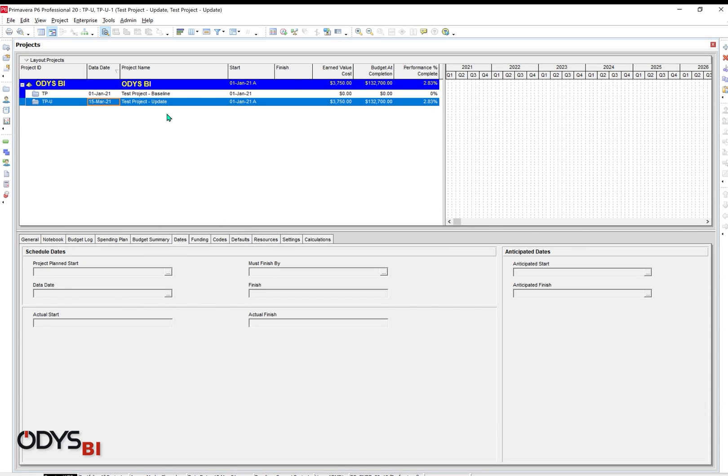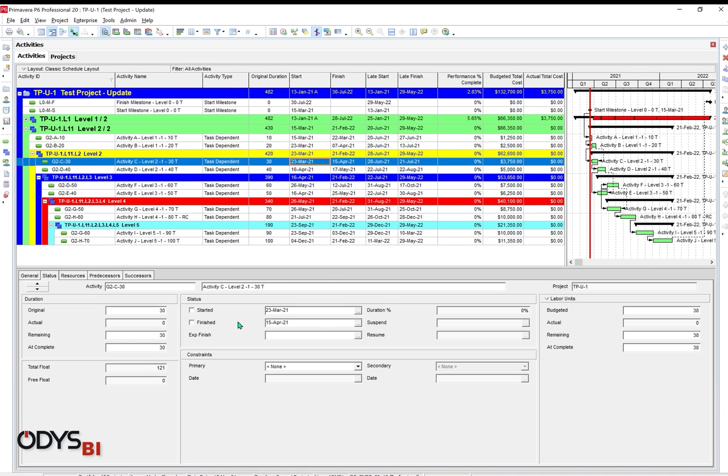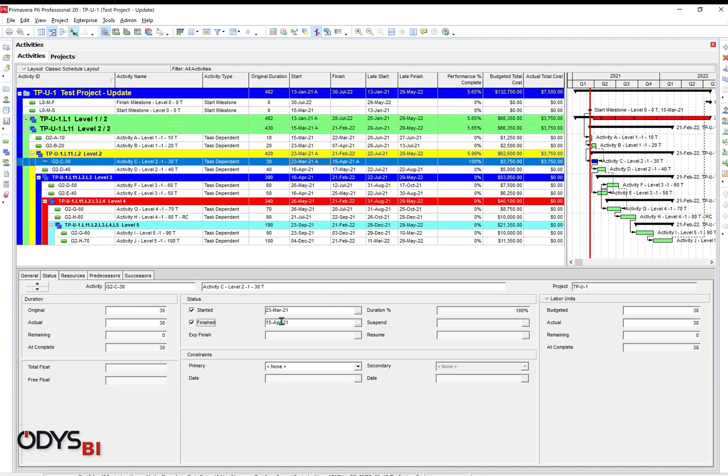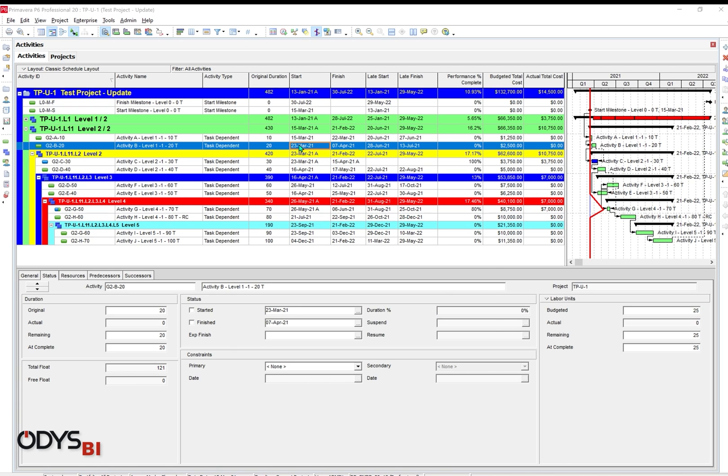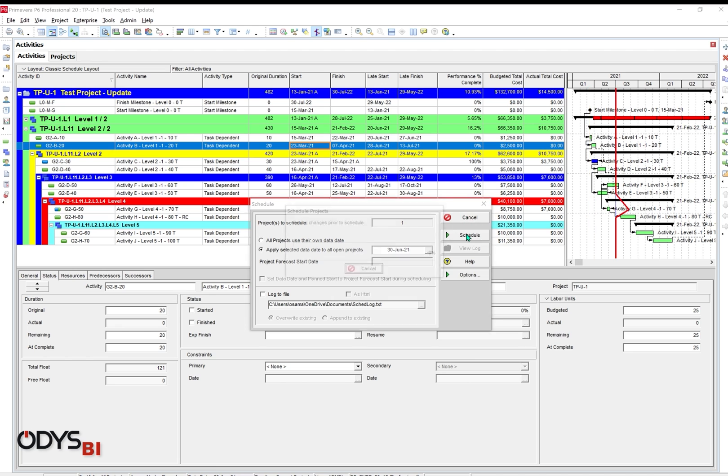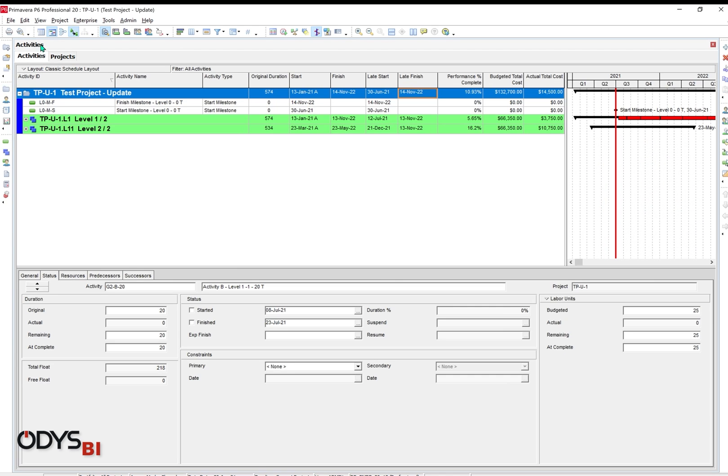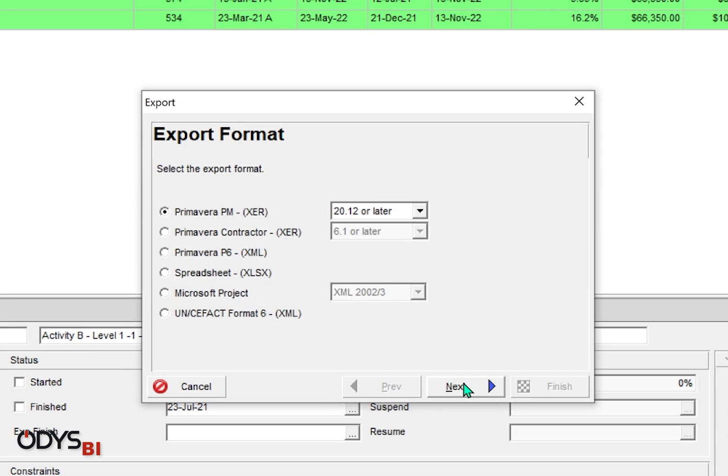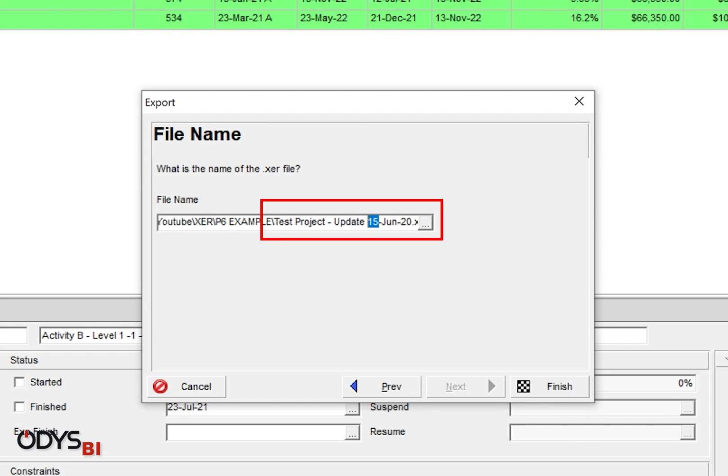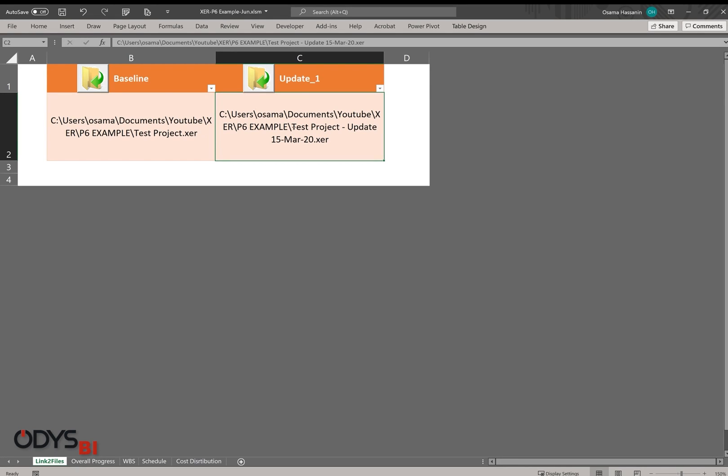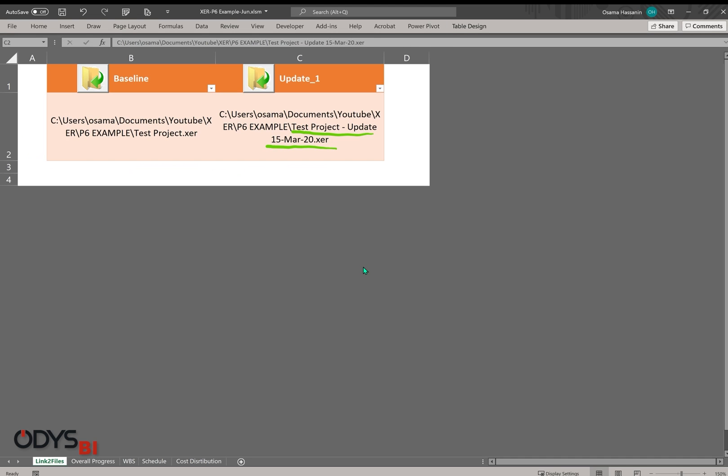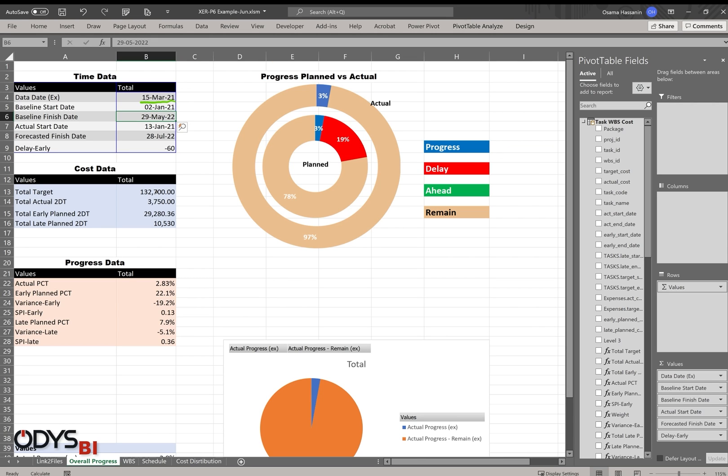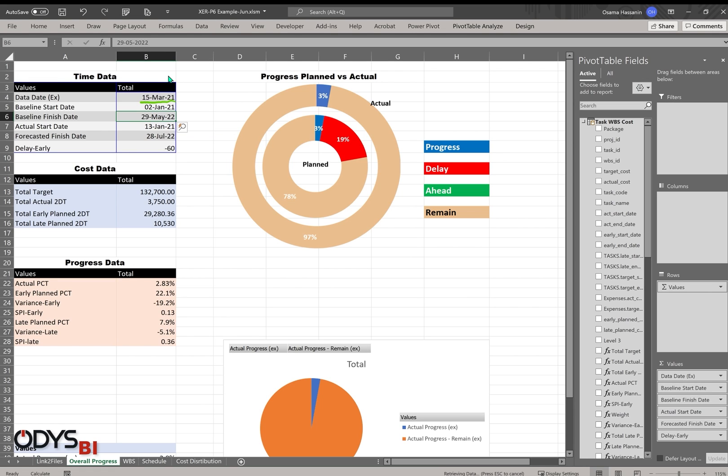Now let's create a new update for our example project in Primavera. Update some activities. Schedule the project with data date 30 of June. Export the project data in XER format. After that, I will open the new XER in our Excel file to follow the updating process. Now in our Excel, let's add the new XER update under the field of update number one. Now as you can see, still the data date is 15 of March. Data, refresh all. It will take a couple of seconds until it will be refreshed.